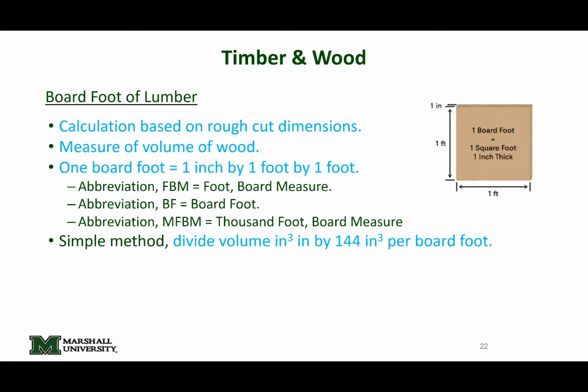Okay. So, what is a board foot? A board foot is a unit of measurement of lumber, and the primary purpose of a board foot is cost estimation. One board foot is essentially defined as a plank of wood that's 12 inches by 12 inches and 1 inch thick.